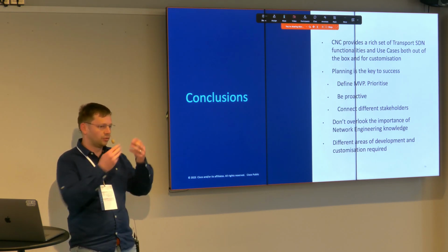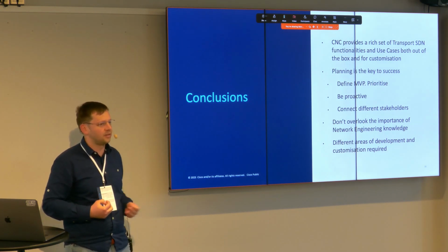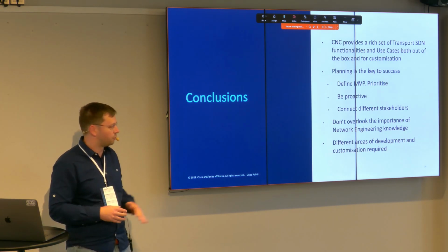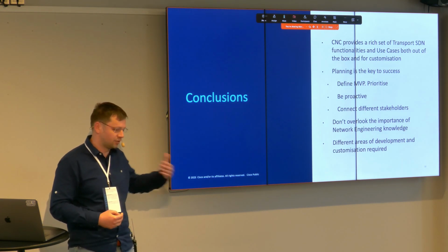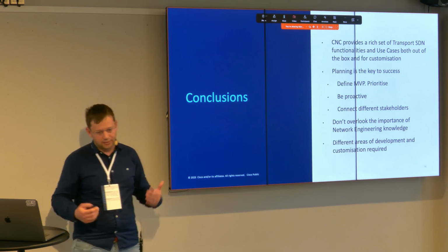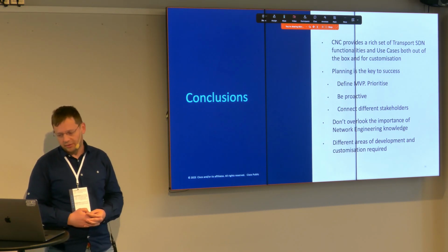So you might have to go to your network team in time and ask them to test these features, because it's a prerequisite and we cannot do without those. And they typically introduce delays, and it's quite a pity to have them in the critical path.